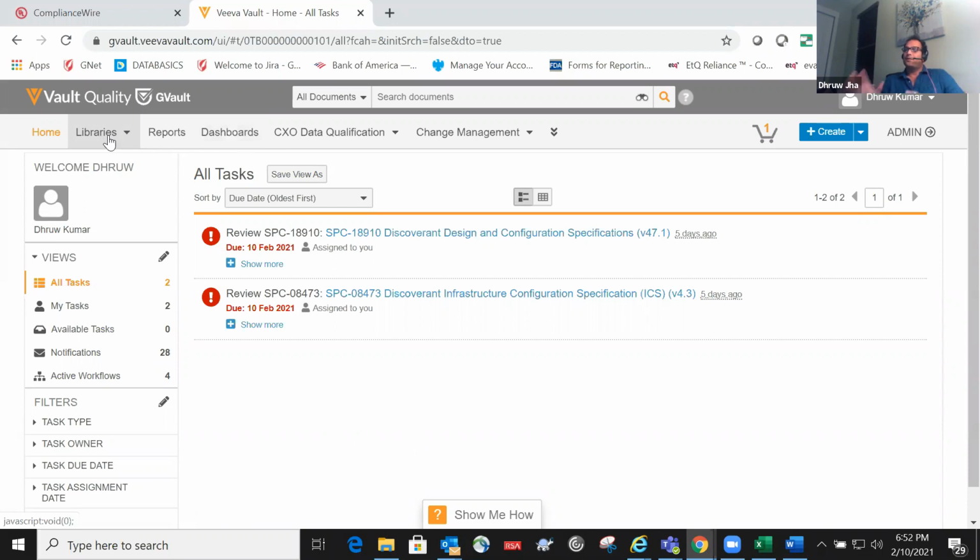Now they will go and start picking all the requirements of libraries. You remember your requirements are categorized. All the library requirements are in one category, and then connected FRS is in one category. So they take the whole chunk and create a mini requirement only for library. And then they're going to start writing OQ and PQ for me. So basically, you could have multiple OQs and PQs for this one system. It's not going to be just one OQ.